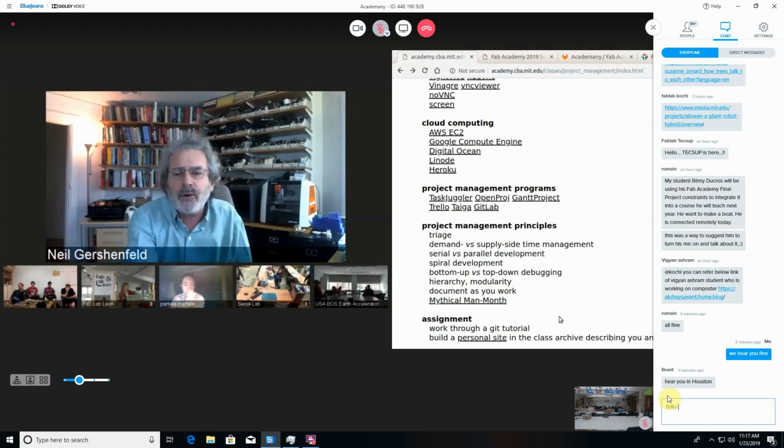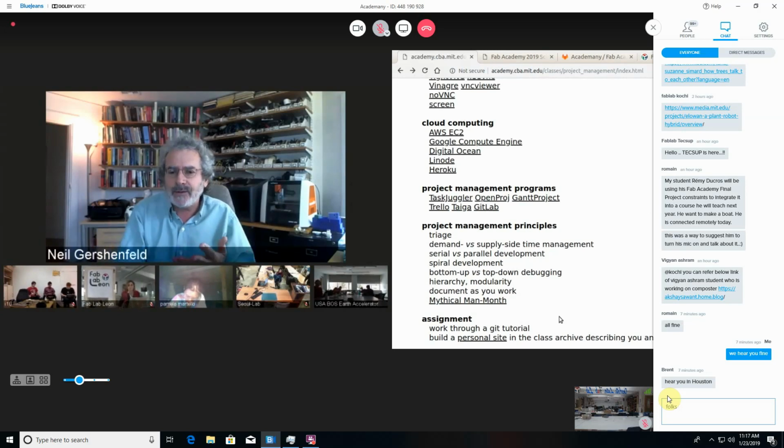So this week you have to build a website. You have 1 week to do it. Rather than just starting to work forward, step back now and make a schedule. Over the next 7 days, what has to happen on each day? And then each day you do as much as you can on that task, and then you stop. And you'll find to a surprising extent, you can work to the task defined by the schedule and meet the schedule. So it's very different working for the time that's demanded versus working to a schedule you set.